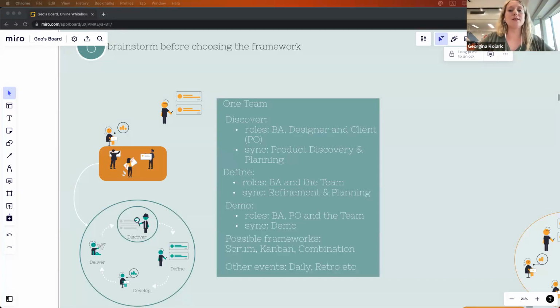Okay, this was just an example, because I often heard, for example, that the product owner is involved in the daily meetings, so he spends his time there. I don't want my product owner to be in daily meetings. I want my product owner to focus on the product vision and do his work. I also had this case, and I said, okay, you want to synchronize? Our board is up to date. Check the board and you will see the statuses.